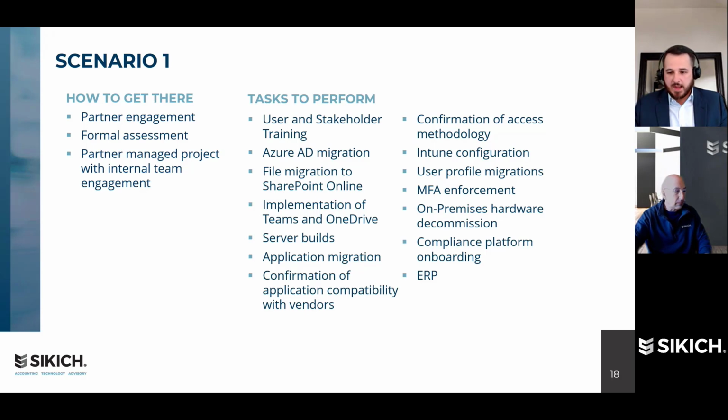So all the tasks we went through before and the how are done here. The user and stakeholder training, Azure AD has to be migrated to Azure AD, the file migration to SharePoint, implementation of Teams and OneDrive, the builds of servers and the migration of those applications, confirmation of the compatibility, so any upgrades that are required or installed, testing and confirming this level of access works with their different user base and the different things they need access to, the configuration and deployment of Intune and the profile migrations and the MFA enforcement.